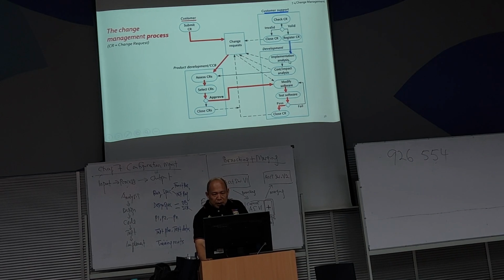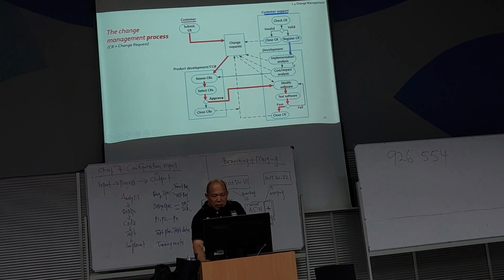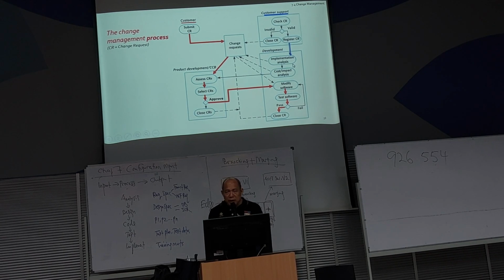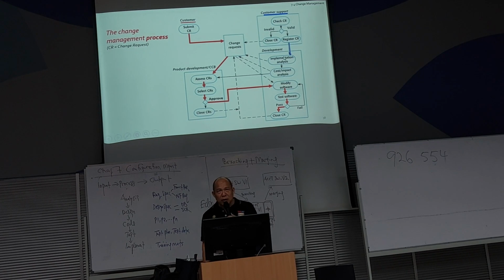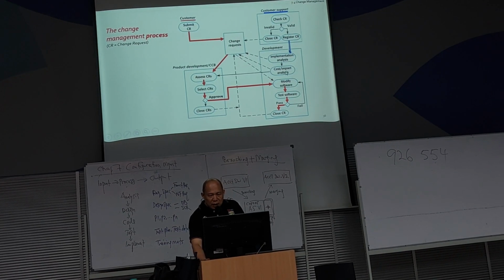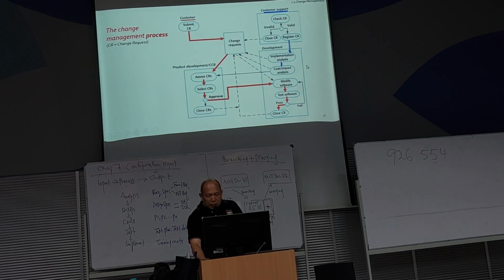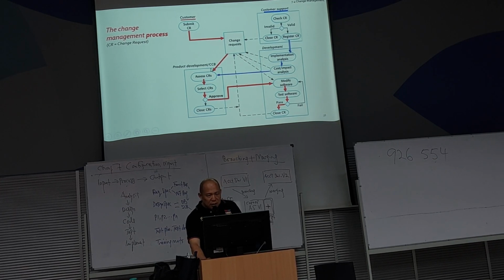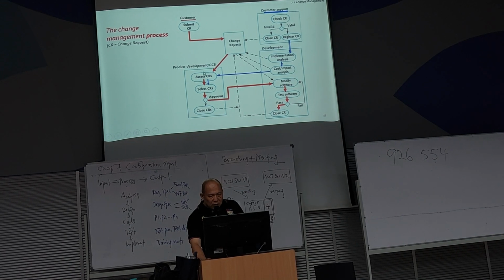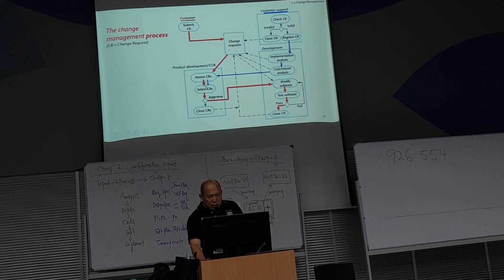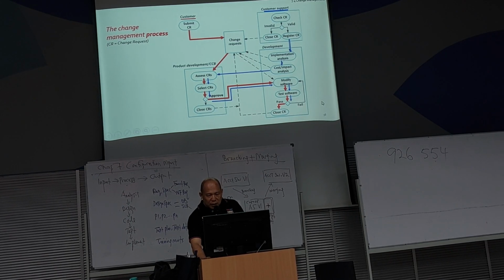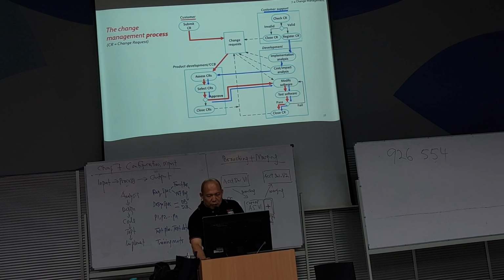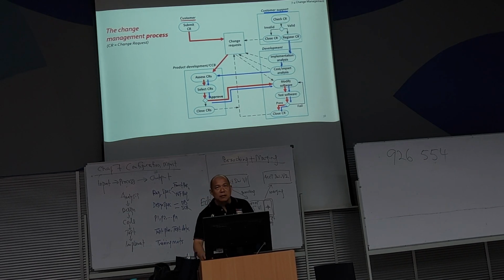Implementation analysis is to see whether the change can be done or cannot be done. Then do cost or impact analysis, and further assess. Select the change request: approve, modify, test. After the test, if passed, close the change request.